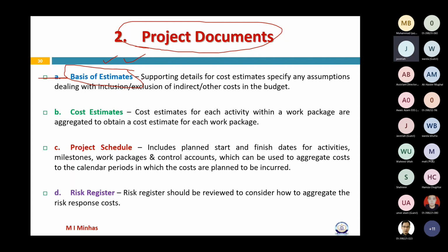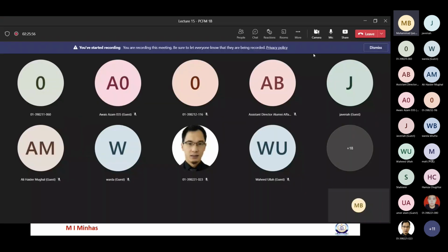Sir, whenever we make an estimate, we are either looking at OPAs or EEFs, or any assumptions on which we are relying to calculate any estimate, right? So because of that, we have used a certain estimate, but during budget, these assumptions might change. Okay, these assumptions might change. So now we need to see what assumptions were there to make this estimate. Just a minute, please.